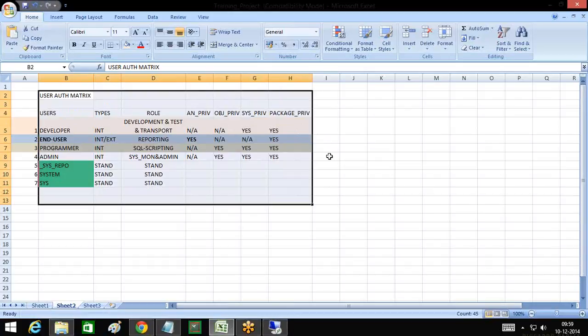Advice to all security consultants, basis administrators, including application consultants, HANA. Once you take a sign-off, additional requirements of change in the security pattern could be picked up and delivered in the next phase of the project. So for the first phase, have this kind of an Excel worksheet with the matrix, build it, test it, sign off, and then proceed with it, go live.